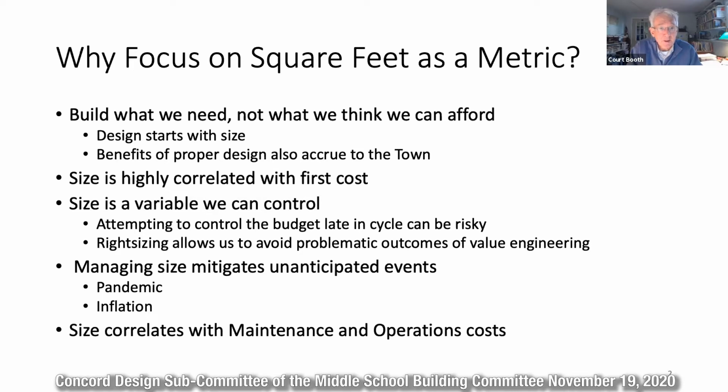And you can see here that we know that we're at the cost discussion, the budget estimate discussion, and size certainly is a major consideration, and indeed one that at this point we can control. I am very keen on this idea of focusing on design, size, and cost now so that we don't have value engineering upend a lot of the quality that Dr. Hunter and her team want. And I think this will serve that purpose of reducing the value engineering at the end that could have educational implications.